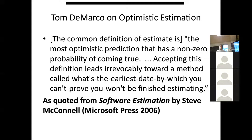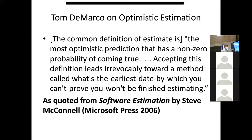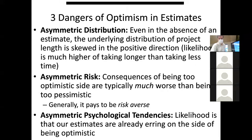Steve McConnell notes that the most common definition of 'estimate' in software is: the most optimistic prediction that has a non-zero probability of coming true. The problem is that this leads irrevocably toward what's called 'the earliest date on which you can't prove you won't be finished.' This leads to systematic underestimation and projects that are actually technical successes being judged as failures — sometimes even cancelled — simply because the estimate was wrong.